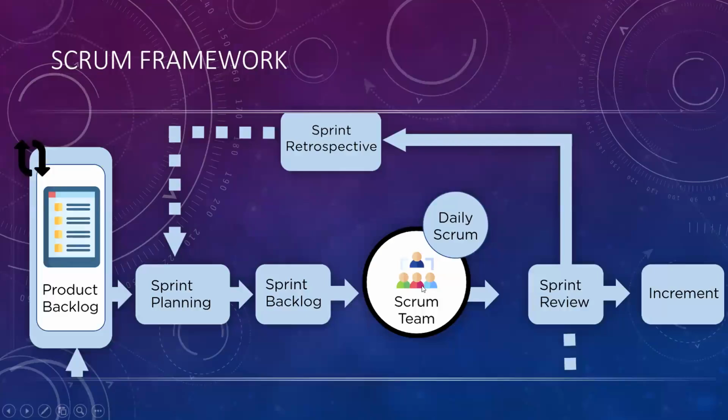Now the Scrum meeting is a daily stand-up. The daily stand-up will last for 15 minutes. What I am doing, what I have done so far, and what I will be doing tomorrow. These are the three things considered as part of stand-up meetings. So here you can see this is the daily Scrum, or stand-up meetings.